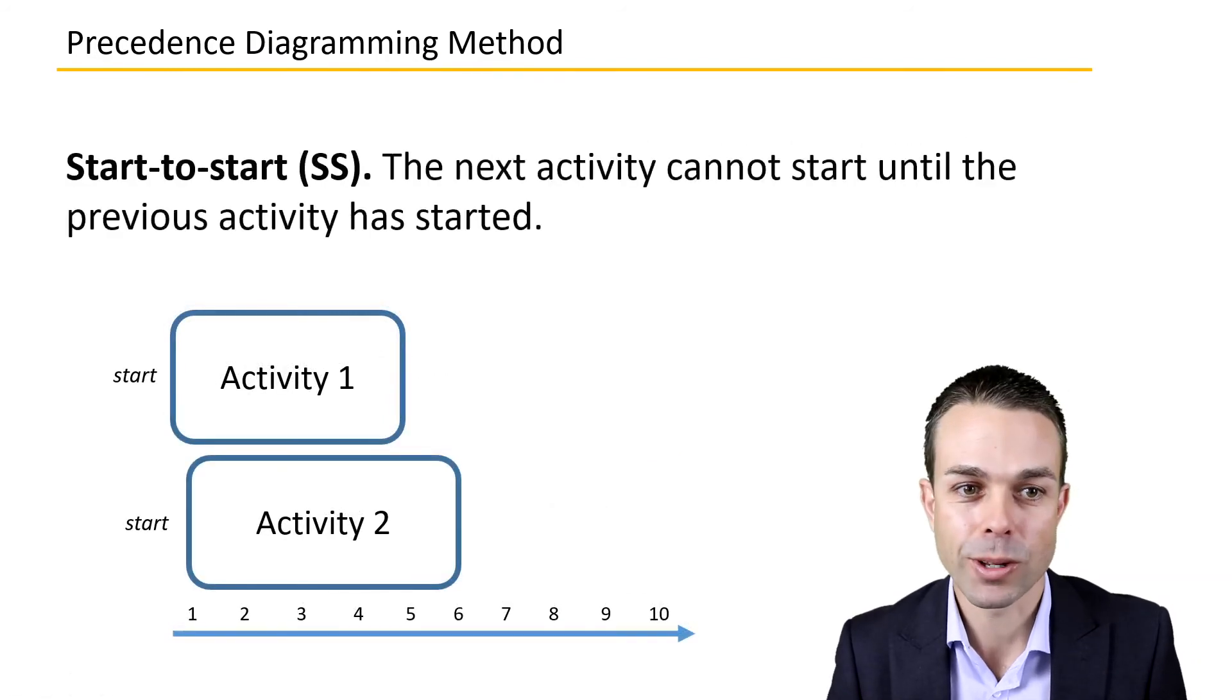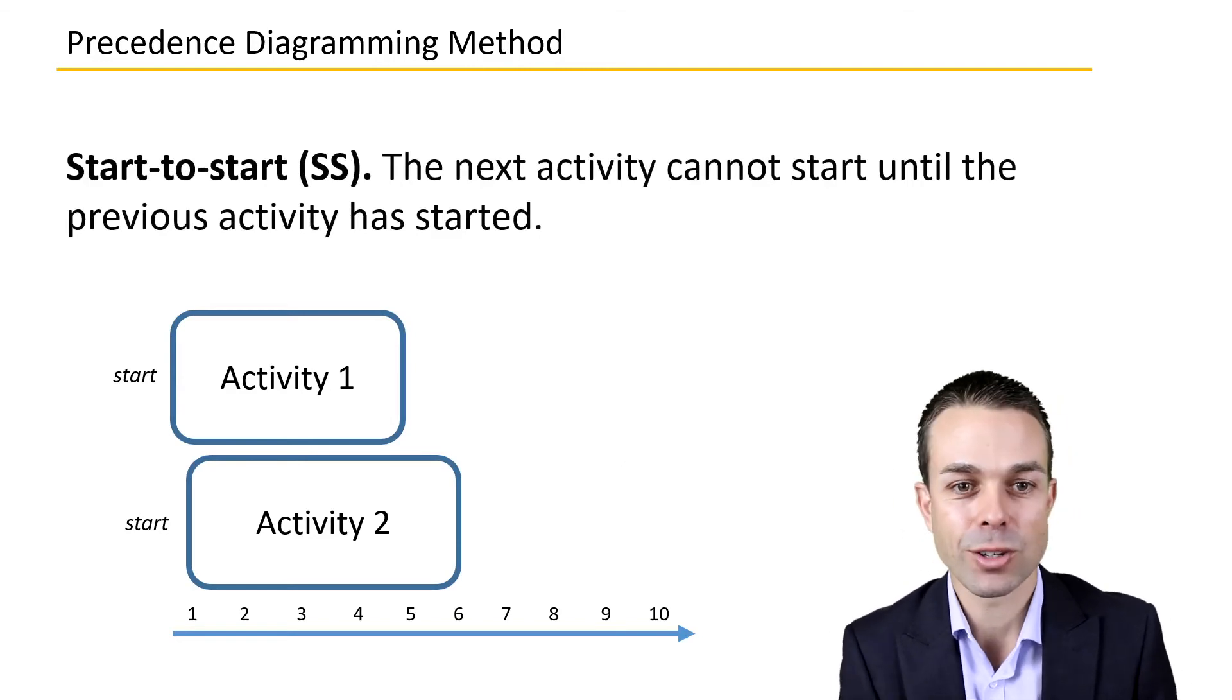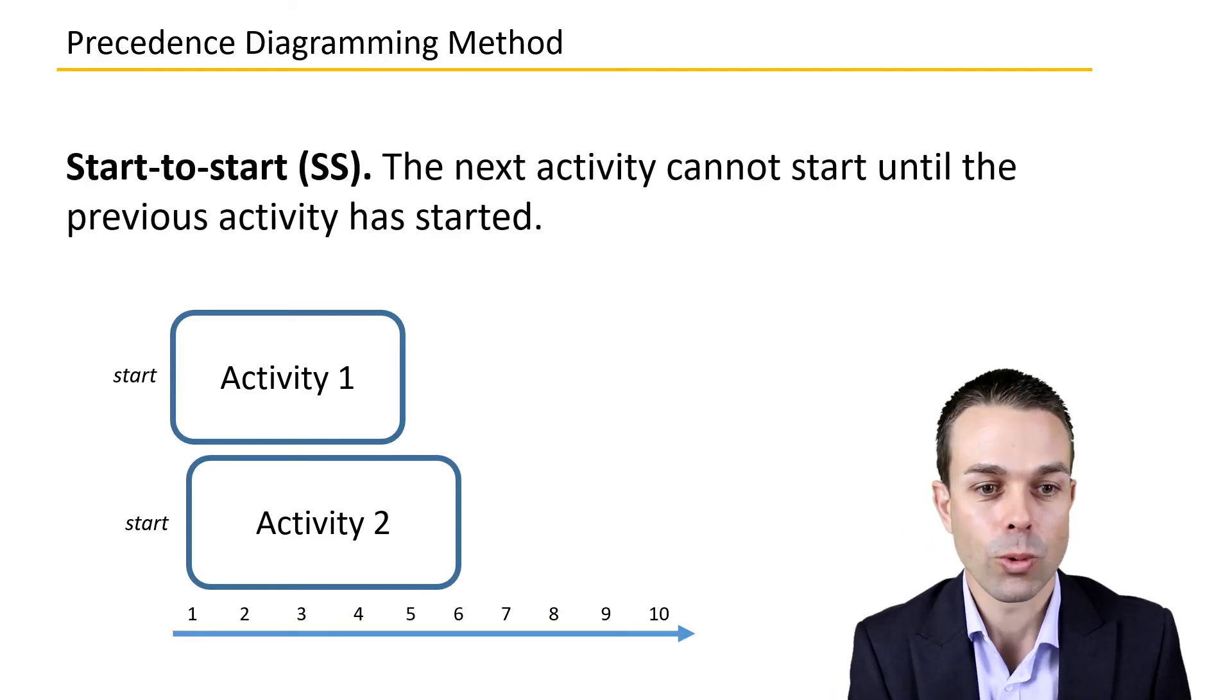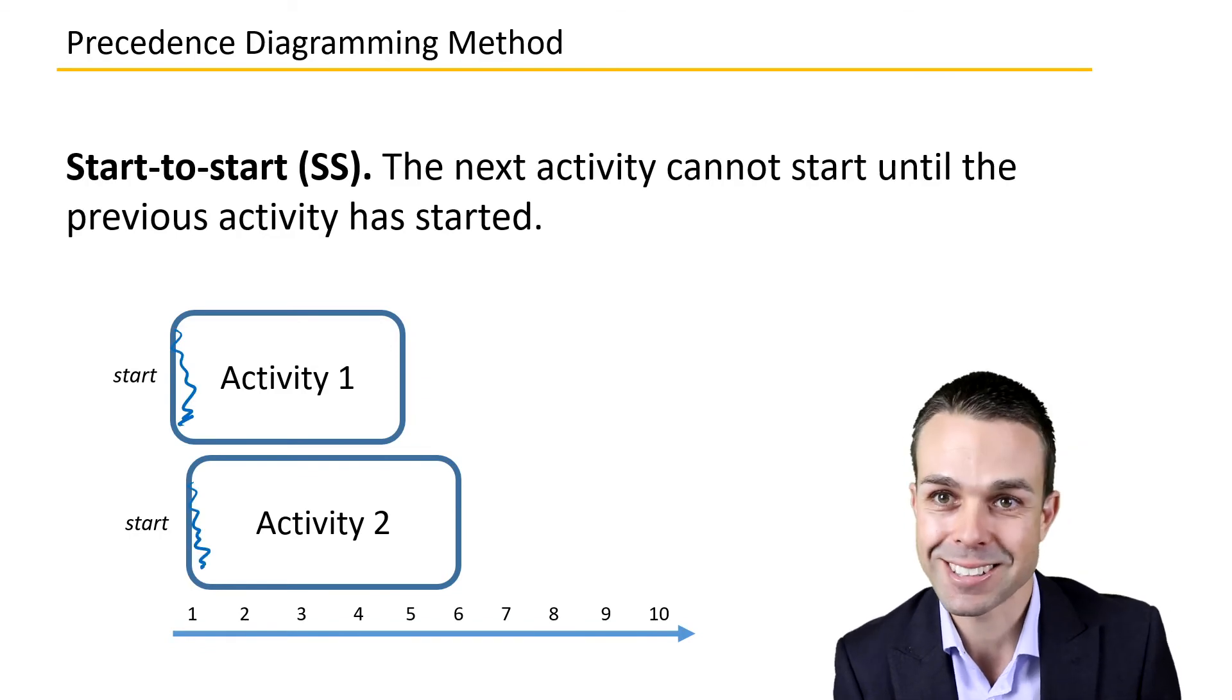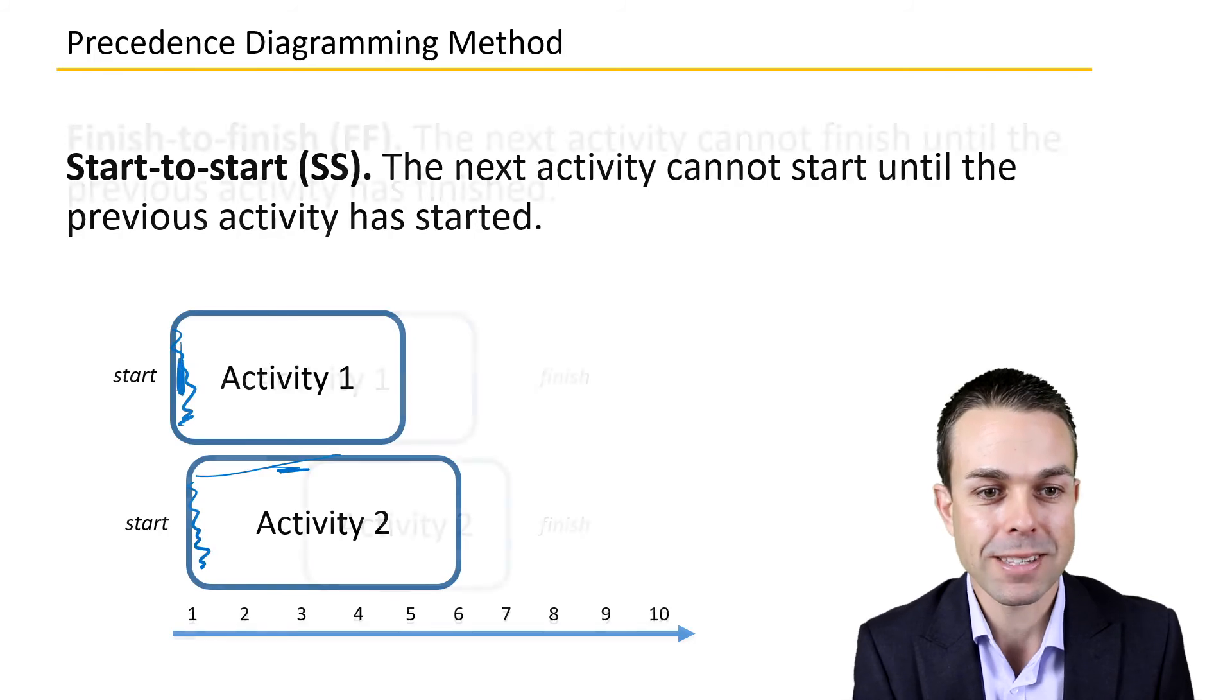The next one is start-to-start, where the next activity cannot start until the previous activity has started. We need the first activity to start before we can have our second start, so this activity is dependent on the first activity starting.